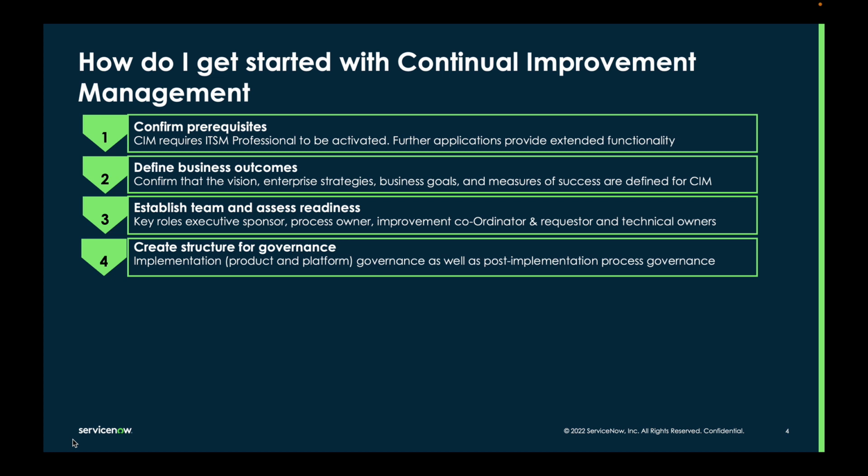Step 4. Governance for your CIM journey should include both implementation governance as well as post-implementation process governance for the long-term success of CIM in your environment. Your implementation governance team should include members for your post-implementation governance activities. Create a CIM implementation governance committee. Assign your ServiceNow platform owner, business process owners for ITSM, HRSD, CSM, depending on your scope for CIM, IT service desk lead and service delivery leads, project managers, technical resources, and other business stakeholders as required. Your executive sponsor or their delegate should chair this committee.